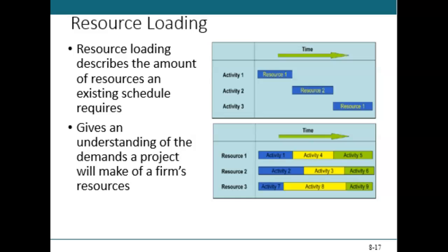Resource loading schedules is definitely a trend, and it's gaining momentum, right? So, in fact, the Defense Contract Management Agency, some of you may know it as DCMA, they have a 14-point checklist, and one of it is the schedule resource loaded, right? So it's a real thing. It's useful. Loading resources against each task or activity does take time and discipline to complete and maintain that plan, right? The reality is that you're going to do it anyway, so you might as well do it in a formal way and share it, right? It's a communication tool at that point.